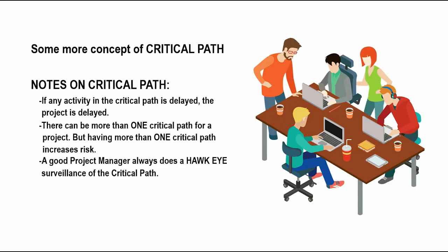Knowing that, let us move ahead and understand some more concepts of critical path. First, if any activity in the critical path is delayed, the project is delayed. This is very important, since the CP is the longest duration path. If any activity in the CP is delayed, then the project gets delayed. So, you need to keep this in mind.